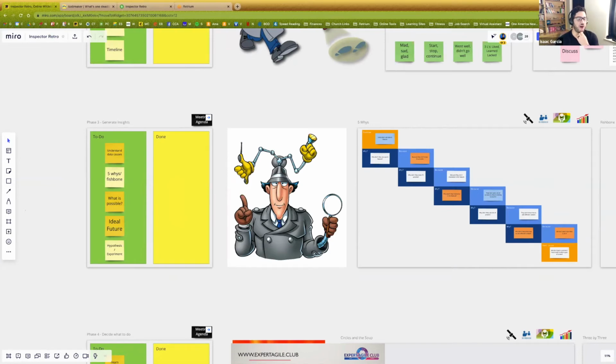Miss having teams that talk, teams that don't talk. It's easy to just say, they just won't talk. We as facilitators need to find ways to make them talk. And what I would recommend, if you have a team that will not talk, you can't get meat out of them, spend most of your time on the icebreaker and the close. Why do I say that? Because the icebreaker is safe. I can talk about if I like cats over dogs, no problem.